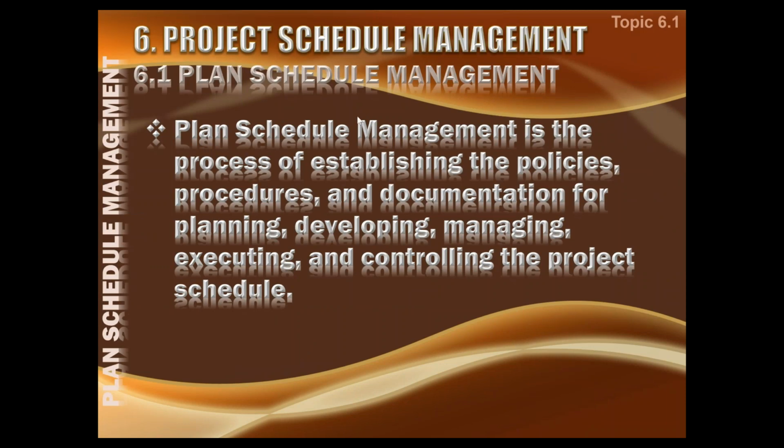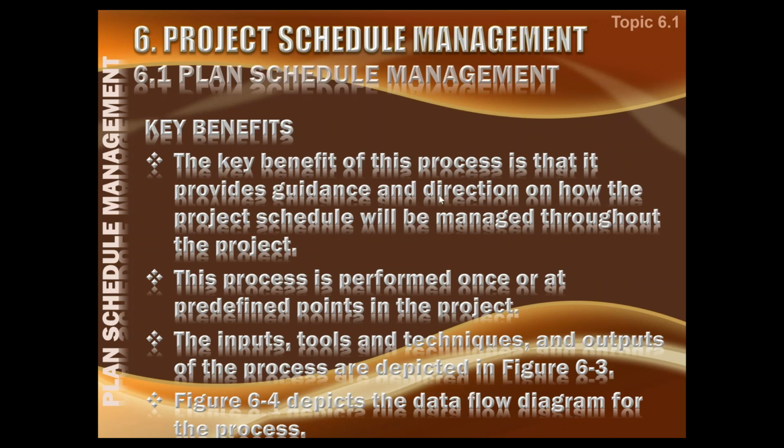So plan schedule management is a process of establishing the policies, procedures, and documentation for planning, development, managing, execution, and control of the project schedule. Meaning what? For the remaining project, whatever is to be done about scheduling is to be established. The guideline has to be established here. The key benefit is that it provides guidance and direction on how the project schedule will be managed throughout the project, and this is performed once and at predefined points, meaning in the beginning of every project and in the beginning of every phase. But again, this is only true for predictive life cycle.